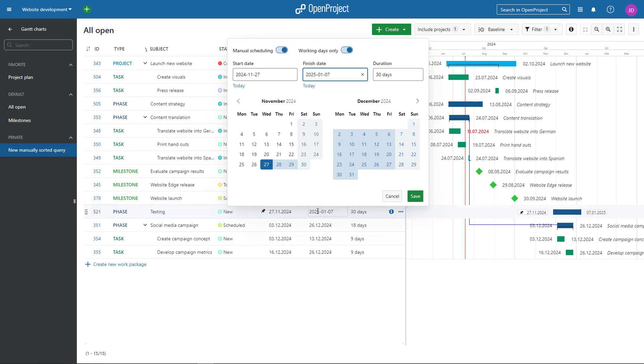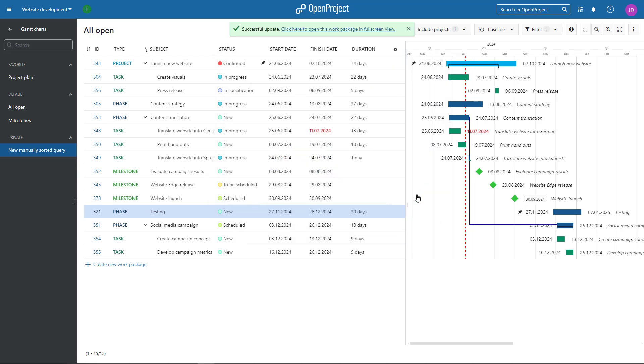For scheduling, you can switch between working days only or the full week. Changing the duration will affect the finish date of this work package.